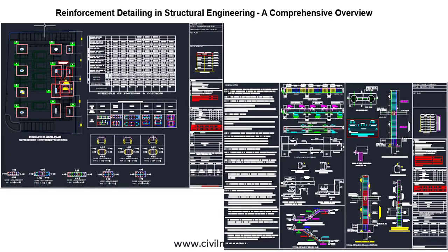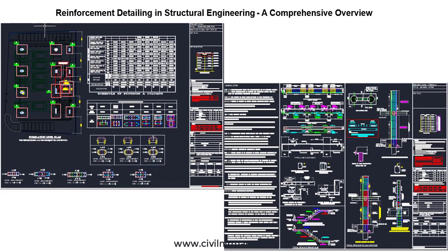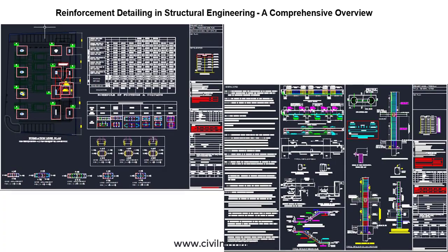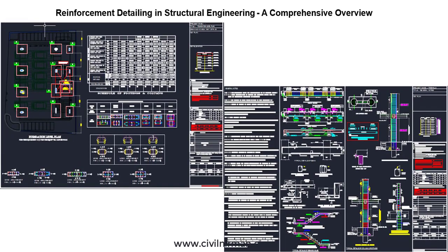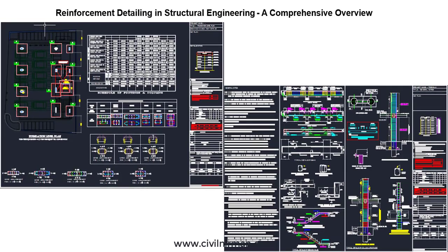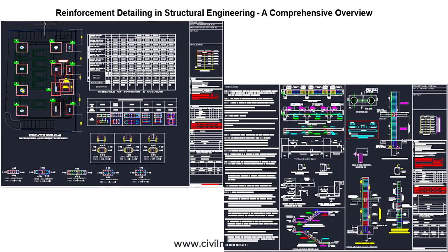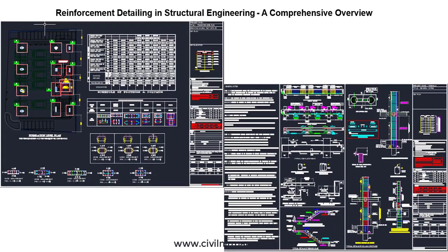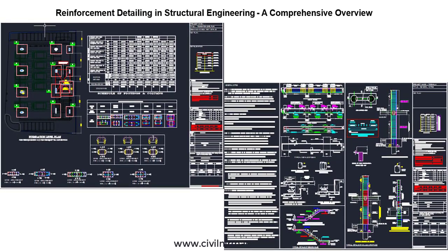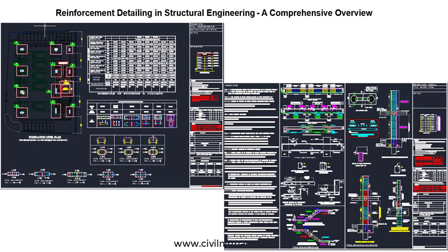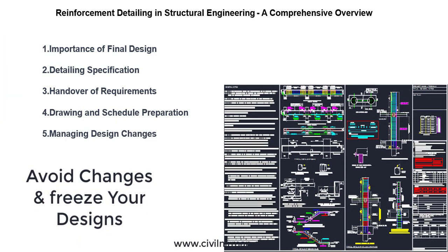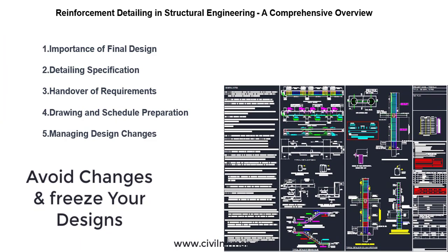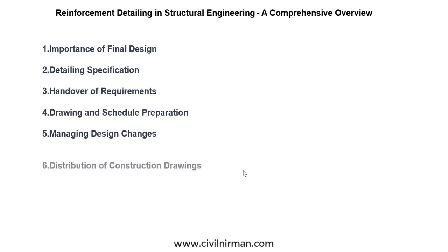Next, managing the design changes. Now as far as possible, design changes once detailing has started should be avoided. Any changes significantly affect and interrupt workflows, increase workloads and greatly increase the risk of errors. However, there are often situations where final design information is not available and design developments and checks cause alterations or requirements to change. While not ideal, changes are almost inevitable and their control needs to be addressed. An agreed system of design phase control is most beneficial.